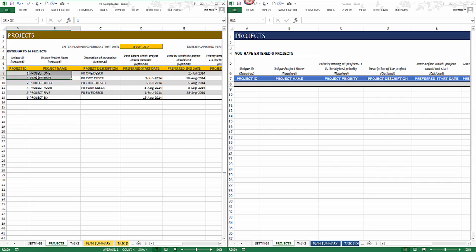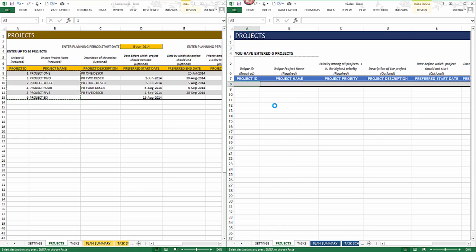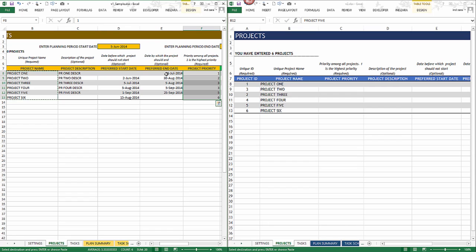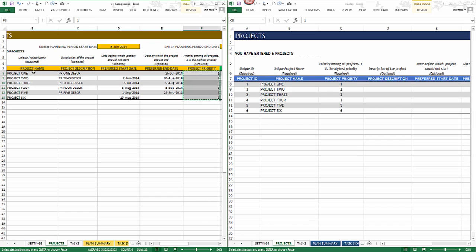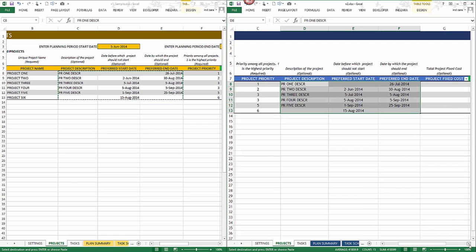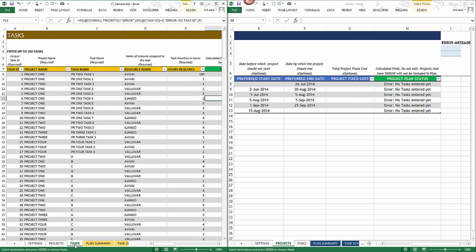Now let's look at projects. Select the project ID and project name, copy, right-click, paste special — values. Then move on to the project priority column, right-click, paste values. Then come back and copy the project description, preferred start date, and end date, and paste them over. Project fixed cost is a new column — if you want to track any additional fixed costs, you would enter them here.